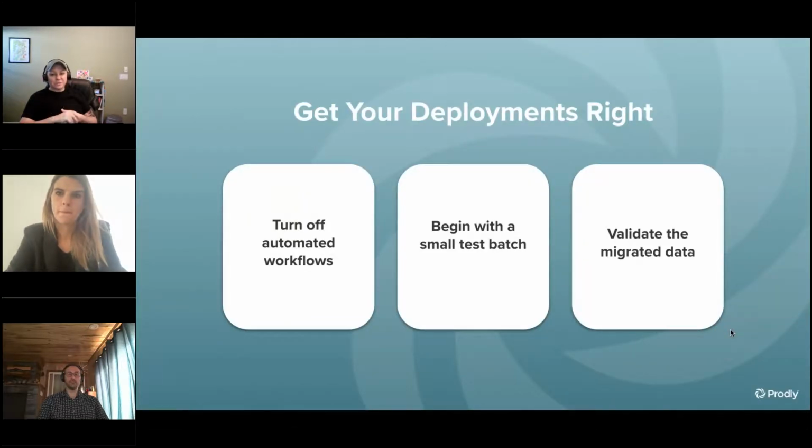Getting the deployments right. Cool. So now we've done all the planning and all the fun stuff on the front end, and all we want to do is move the data, right? And we want to see this thing in action. There's a few things that you should do right before you click the button. Begin with a small test batch. Don't deploy 10 million records if you have not ever deployed the records before.